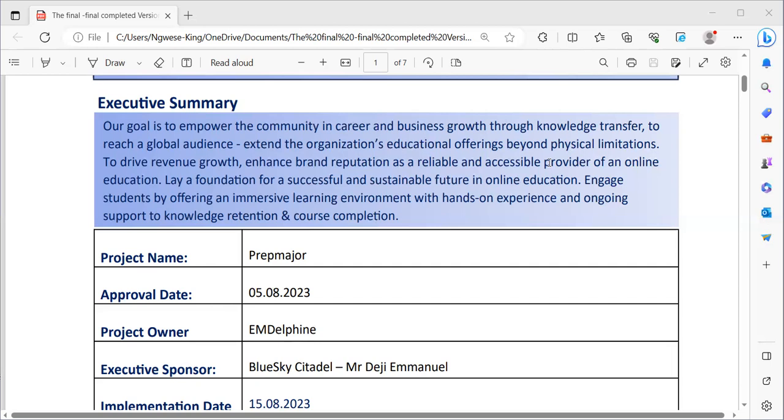So that way, we can set metrics to measure those things, set the KPIs to see if we are meeting them. Because we've got to be checking it. You see what I mean? That's why it's a working document. So if we project something in 6 months, after 3 months we want to check: where are we? Are we making such progress? If we're not, then we come back to the drawing board to see what we are doing right and what we are doing wrong. You see what I mean? Yes. All right.